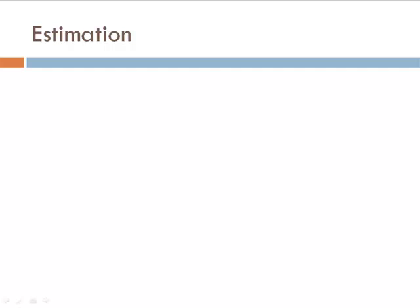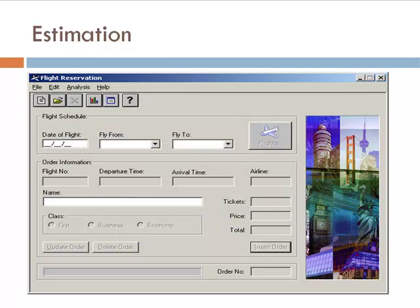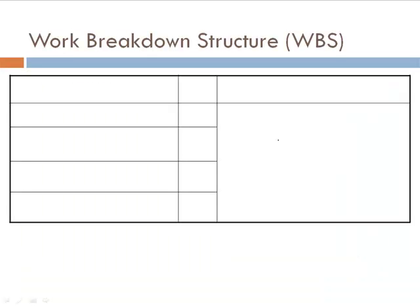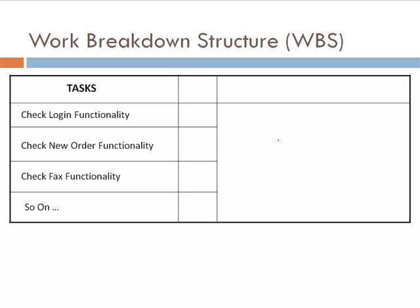Let's do an exercise. For the flight reservation application, prepare a work breakdown structure of the various testing tasks like check login functionality, check new order functionality, check fax functionality, and other similar functionalities, and estimate the effort required to test these functionalities. For example, login functionality can be tested in 2 hours.